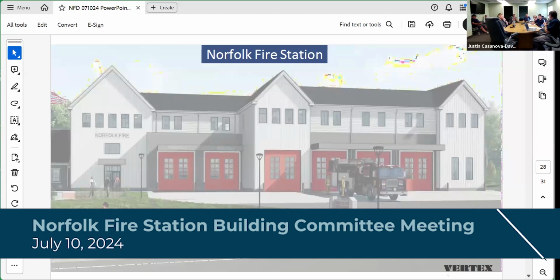And then once the doors arrive, is that just a couple of days for them to install? Does that go pretty quickly, barring any manufacturing issues? It should, because they're building them off site, so it should come almost like a kit. When I say a couple, I give them a week, because you're going to put the frames in and hang the doors with the hardware, and there are quite a few. But once we have the doors, I don't expect any further delays.